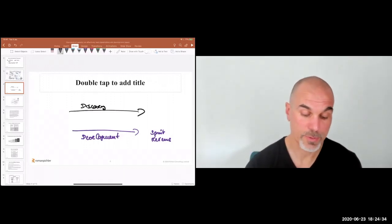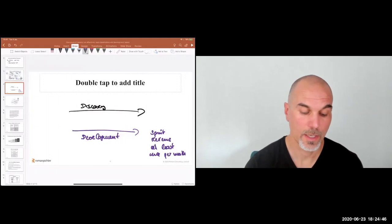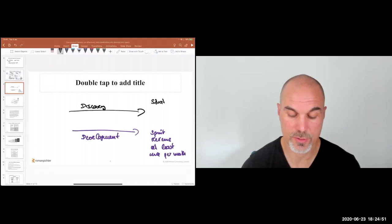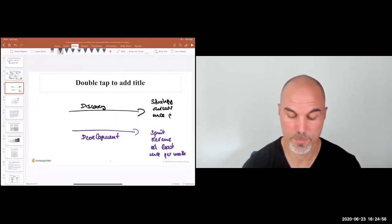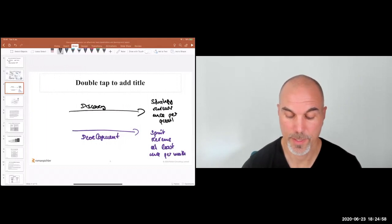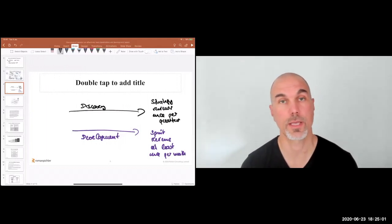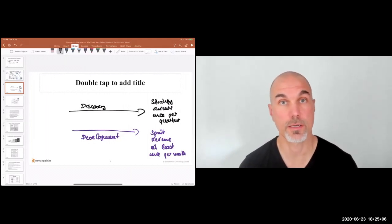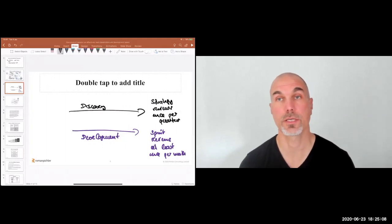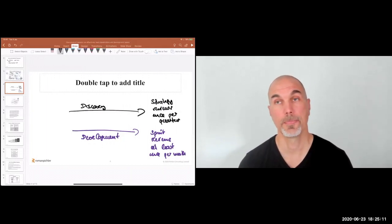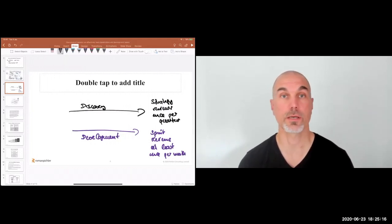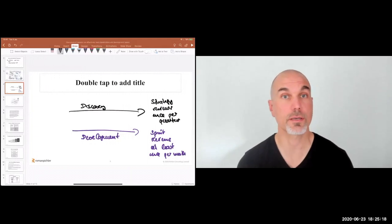With discovery, I would suggest as a rule of thumb that you get together for joint strategy reviews once per quarter, where you look at product performance, KPIs, trends in the marketplace — consumer trends, technology trends, regulatory trends — what the competition is doing, and any bigger changes regarding the business strategy. Then you look at the product roadmap and ask: are our goals and outcomes still valid, or do we need to make any adjustments?